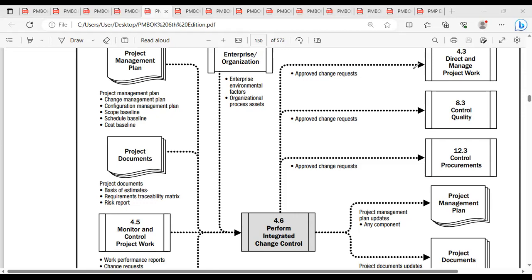And one copy of the performance report will be sent into Monitor Risk. So the company has to see whether the risk profile is a better profile or a worse profile based on the performance report. If the performance report shows all the performances are negative, then you know very well a lot of risk is added. You have to do something. You need to plan your strategy to manage this kind of risk.